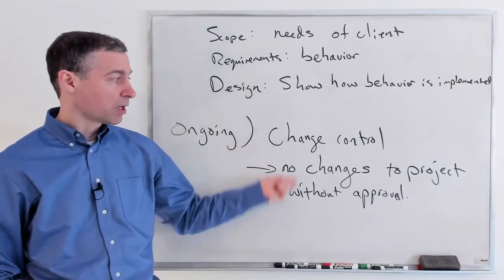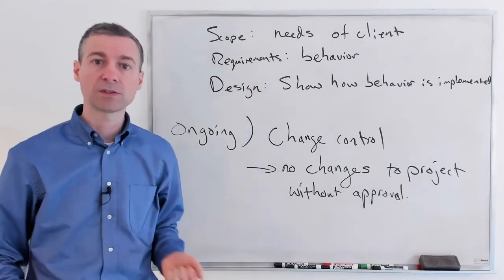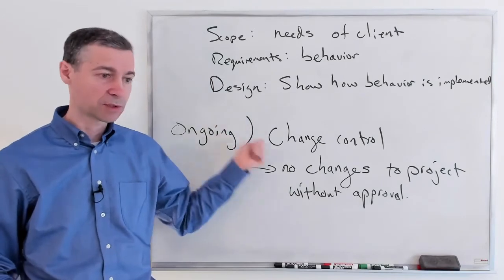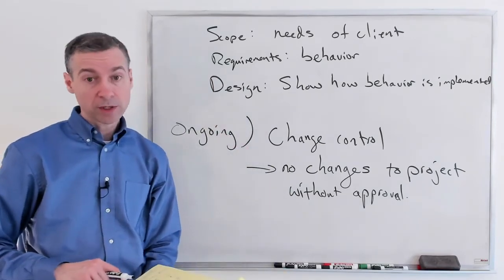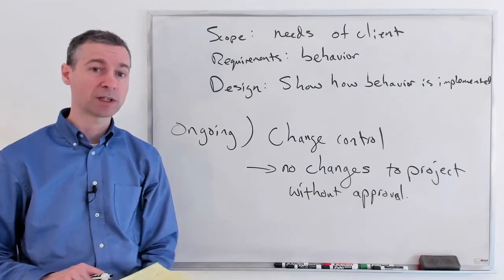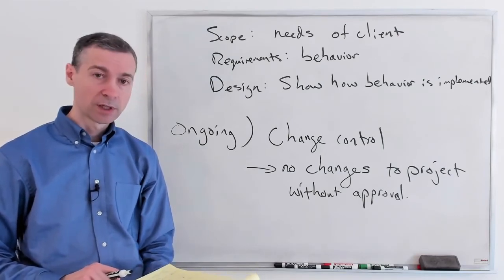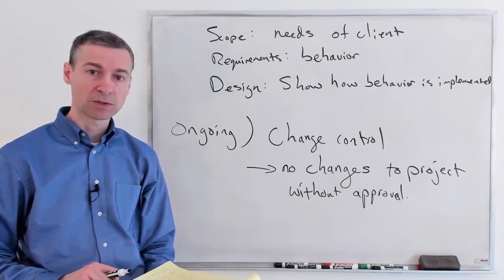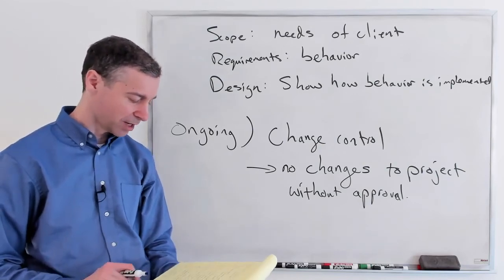And you would have in place the notion that the client has signed off, these are the requirements, and we promise to build it for this cost. By the way, you better have written a really good specification and be really good at estimating everything. Otherwise, you are going to get stuck doing tons of work that you didn't ask for enough money for. There's a lot of incentive to get it right.